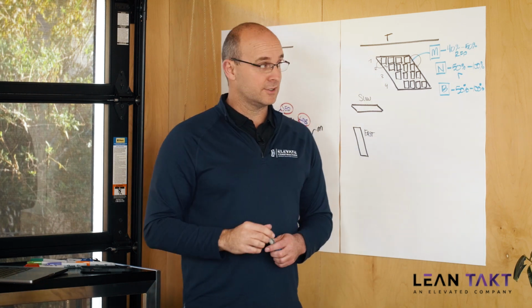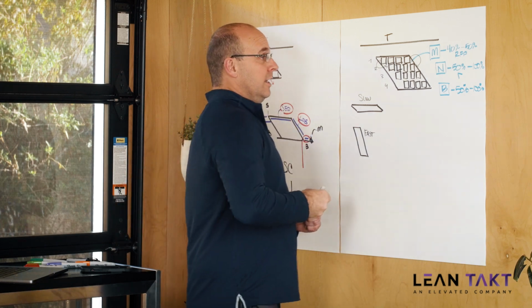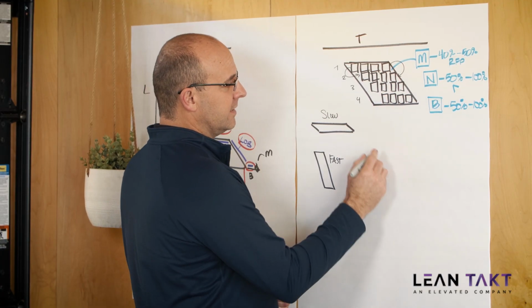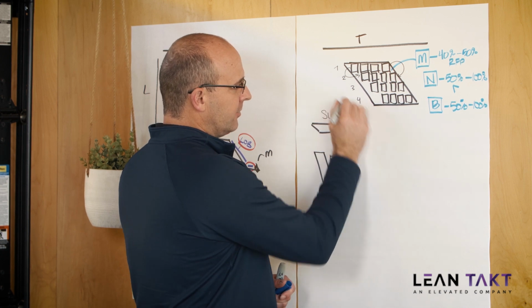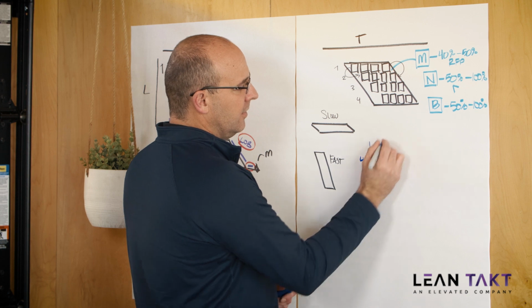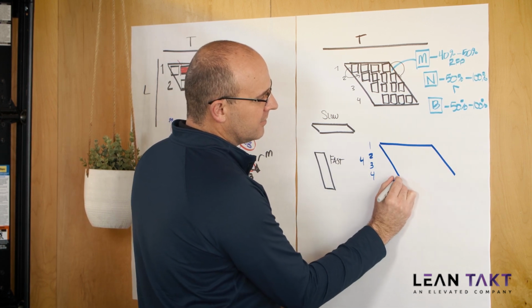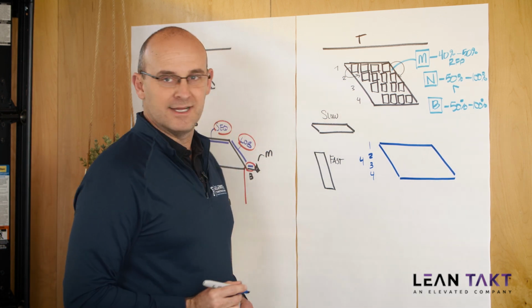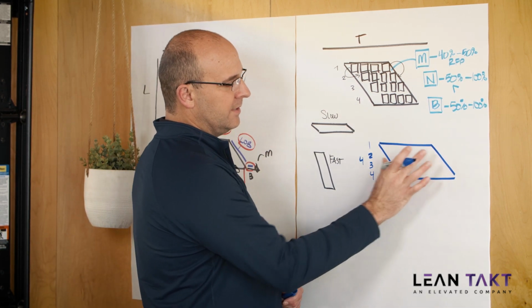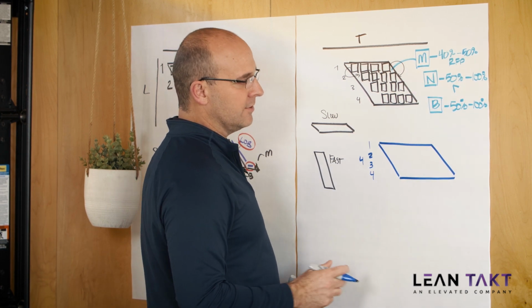Let me go ahead and show this to you right now. I'm going to pick dark blue. Let's say that you had a project that you wanted to estimate, and you're going to do 4 zones on the left, okay? And you're going to have your overall time, and your macro level takt plan phase looks like that, okay? It looks a little bit longer because it's between that 40 and 50% realized flow potential.